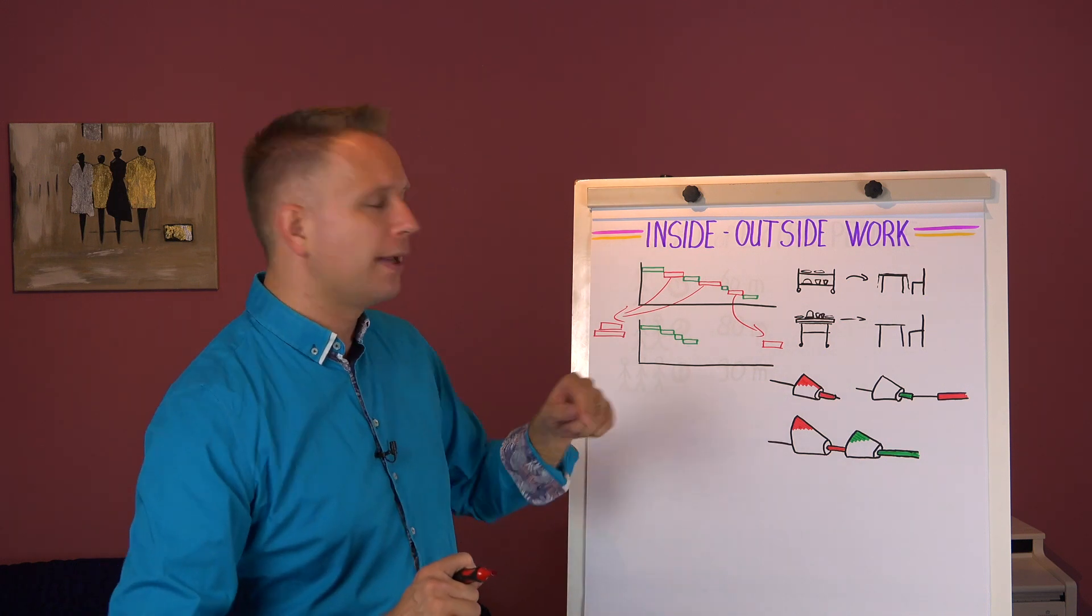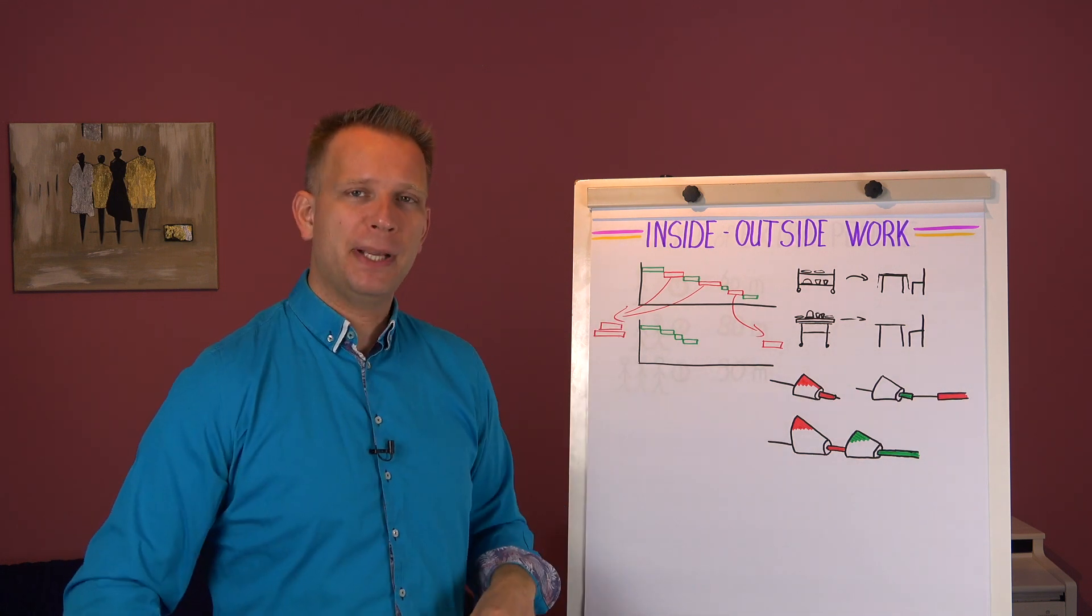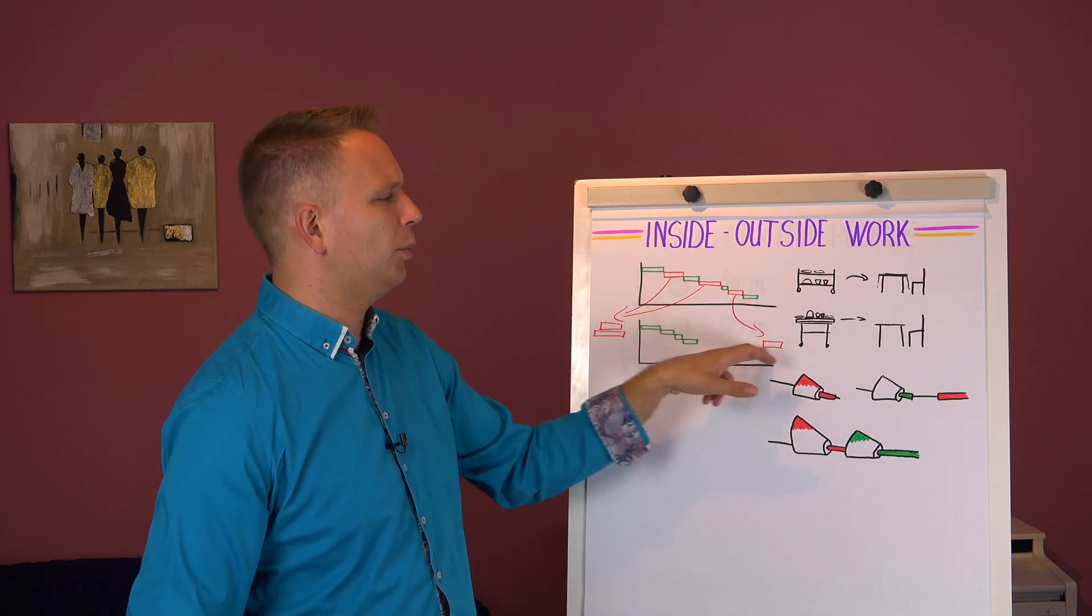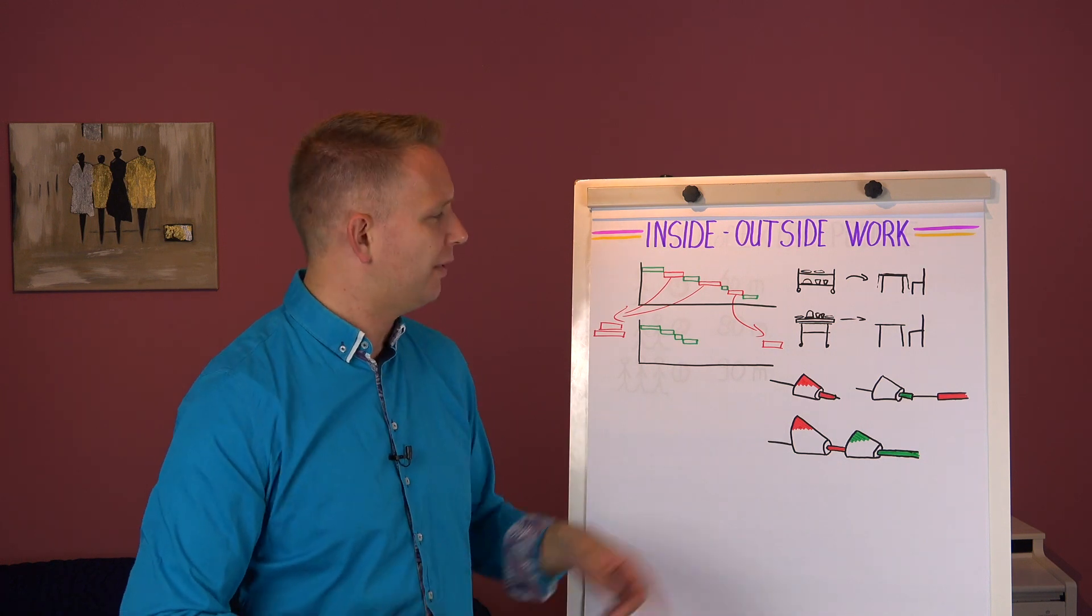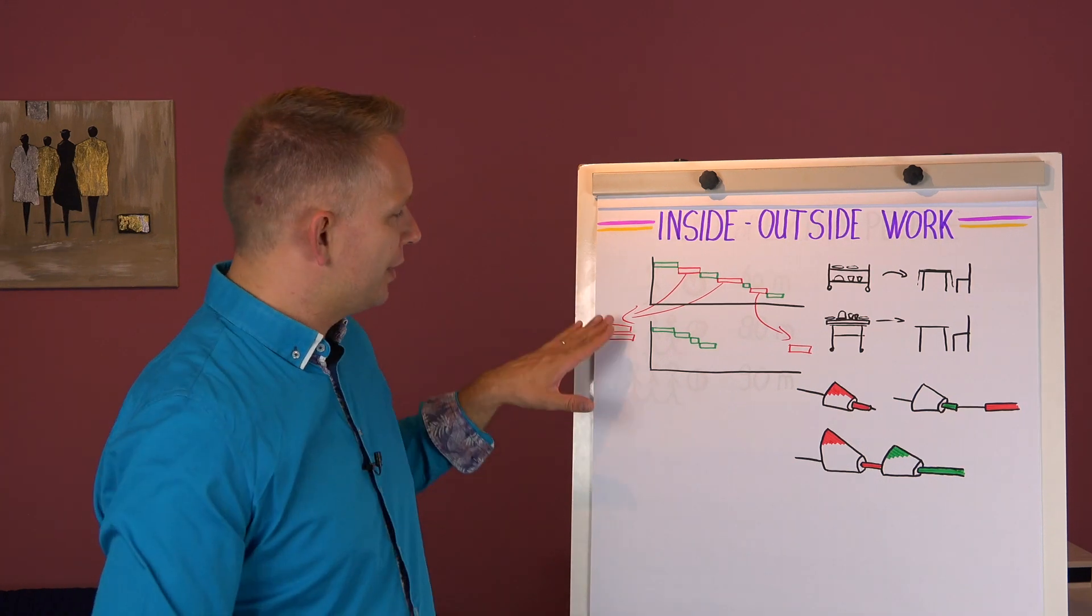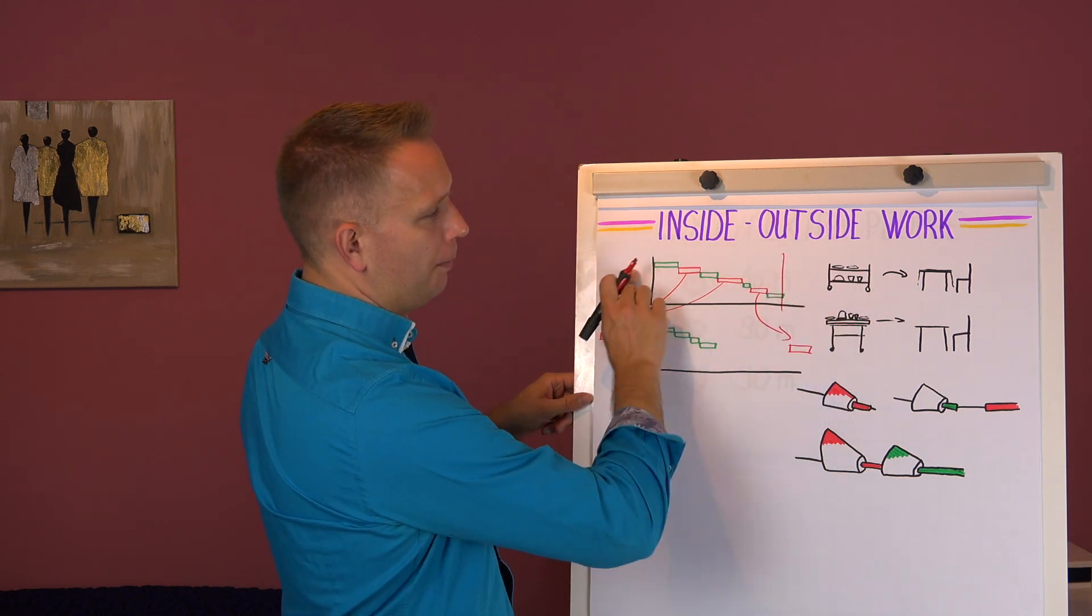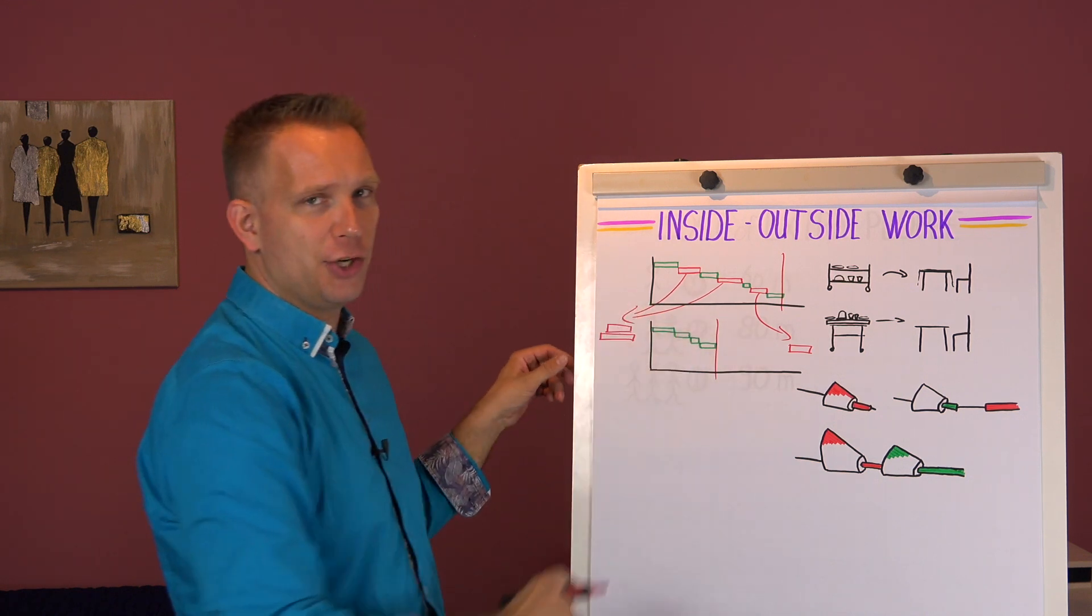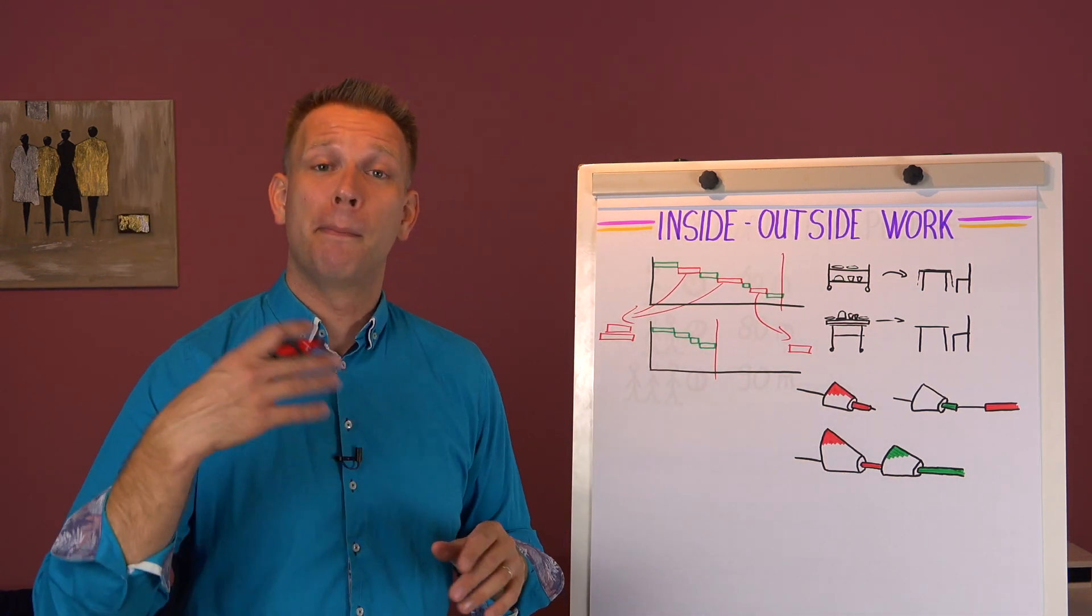And then there is this mixing part that really always gets very dirty and it takes a good time to really scrub it. What we did is we got an identical replacement mixer that will just be put in. Then after we start up the line, we take at some leisurely pace later when the new manufacturing cycle is already running, we take and clean that for the next run. So you see the work did go somewhere, but we went from a pretty long changeover with cleaning to a nice and snappy changeover. We sort of halved the changeover time. Our line is back up and running much more quickly.